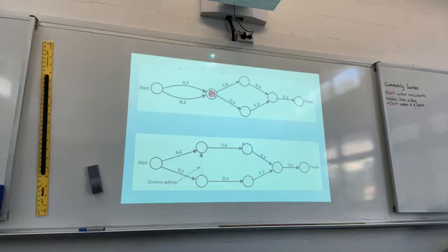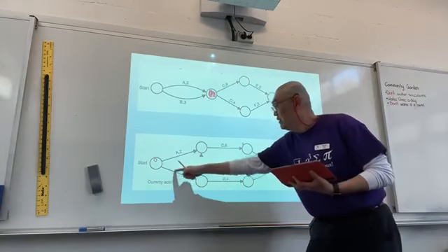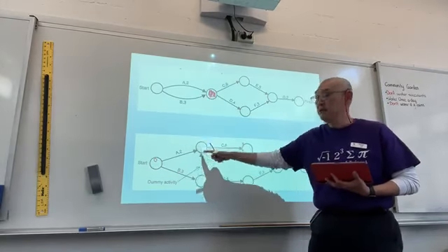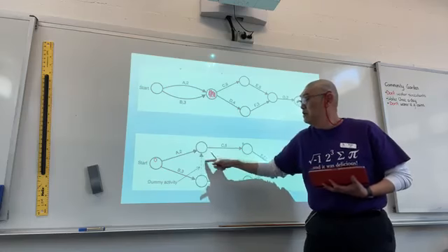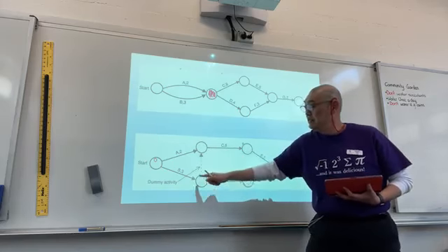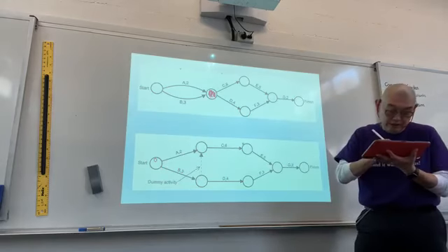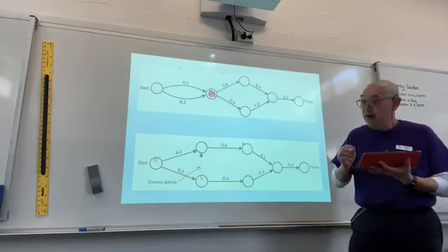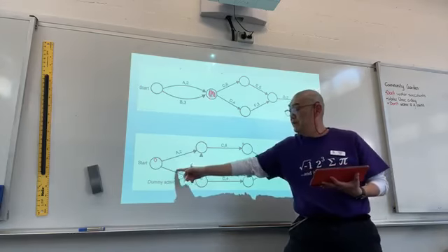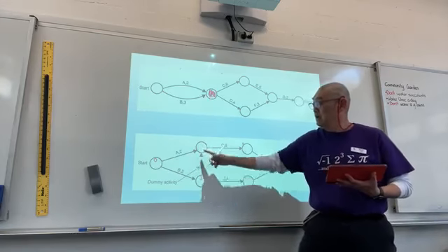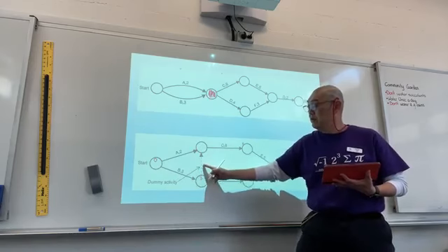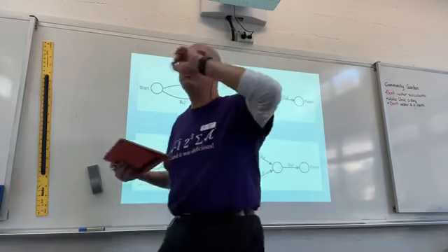So we know what we do when we analyze, we start off with 0, correct? So, straight away we know, from here to here, we've got this and this. Two things are going in. Let's go from here to here first, which is 3. So B3 has to finish. Now here, this is 0, but you still have to consider it as one of the activities.